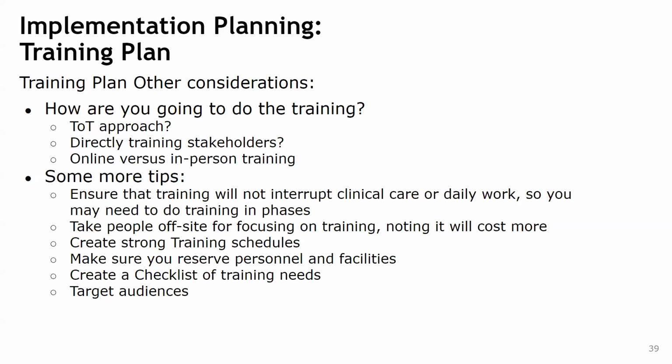And in some areas, you might want to plan your training so that the training itself does not interrupt the clinical work. If you are training your nurses or doctors, you schedule it so that you don't take them all at once and then the facility is left short-staffed. Also, in some cases it's better to take people outside of their work environment so that they can focus on the training, because if someone is within their environment, you might find that during the training they go out to handle some of their tasks.